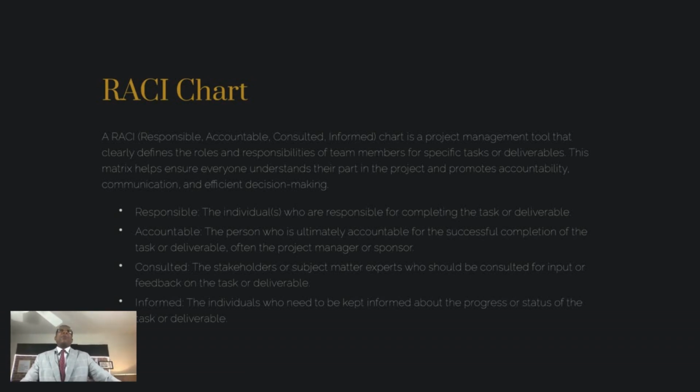Accountable would be somebody that is basically accountable for the successful completion of the task or deliverable. Normally, this again would be a project manager or sponsor or SME. And then the consultant, this is where the stakeholder or subject matter expert who should be consulted for input and feedback on the task and deliverable. And then the last and final one, which is informed. This is for individuals who need to be kept informed about the progress or status of the deliverable.